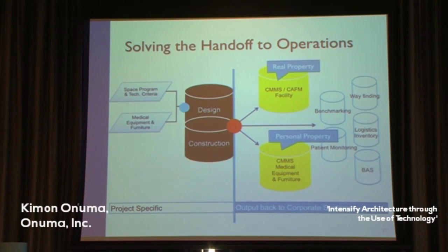What they realized early on is obviously that's a very important task, but even before you get to the red dot, if your data is not structured well at the blue dot section, it always goes back to what do we call things and how are we structuring them to get it into the design and construction teams. Because you're starting at the handoff and you don't have your data structured well, the focus ended up going back to let's focus on getting the blue dot portion running. How do we get our programming data into design and construction? And there was a series of other projects going into the full life cycle as well.